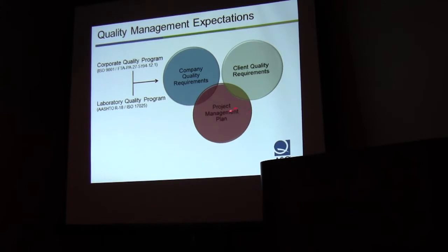And so the way we did that was to develop a project management plan that identifies the specifications that we're going to have to follow. It identifies our process for addressing nonconformances, both process nonconformances like you might be used to, as well as if someone comes across a nonconforming item during an inspection, what is the process for getting that item either okayed for use, or does it have to be rejected? What has to happen in terms of its disposition? So a fairly robust project management plan was put into place for this project.